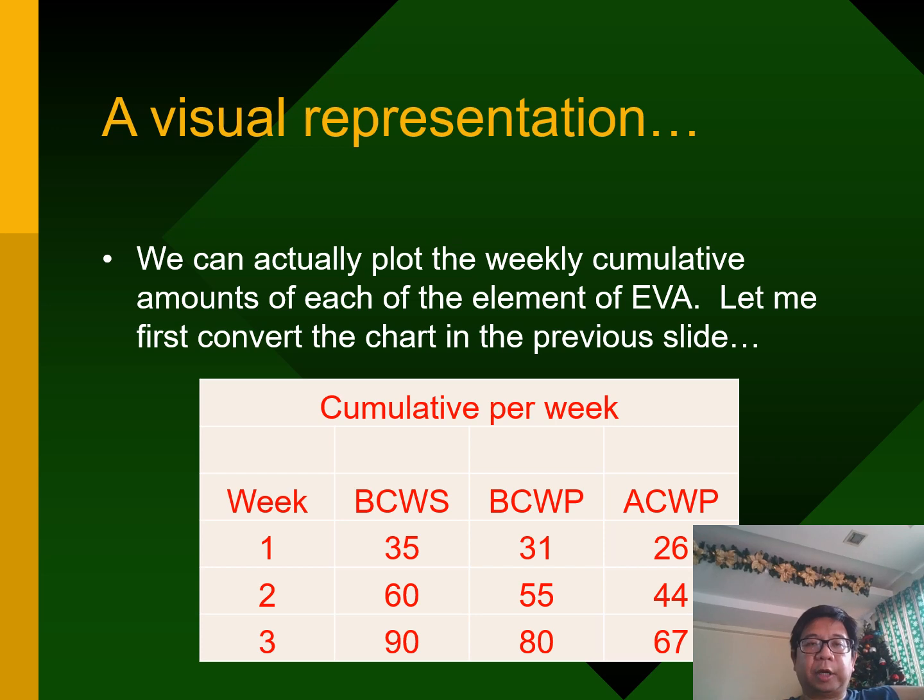For the line chart, which is a visual representation of our earned value analysis approach, we can actually plot the weekly cumulative amounts of each of the elements of EVA. So look at the previous slide and then compare it to this slide. What you're going to see here is that as each week progresses, it's getting higher and higher and higher. The values in the second week is the values of the first week plus the second week.